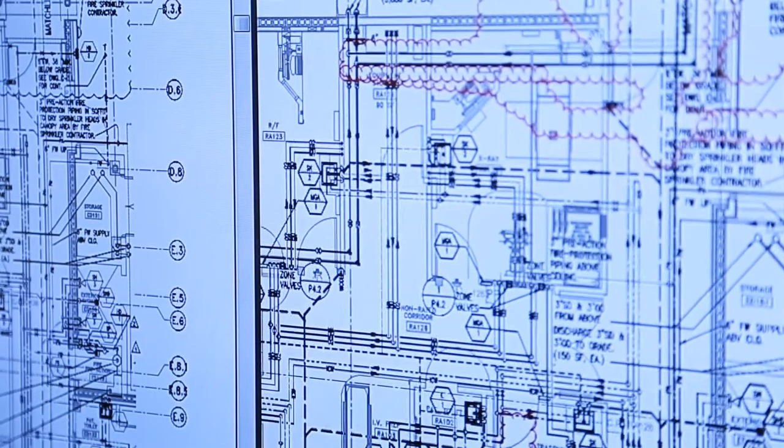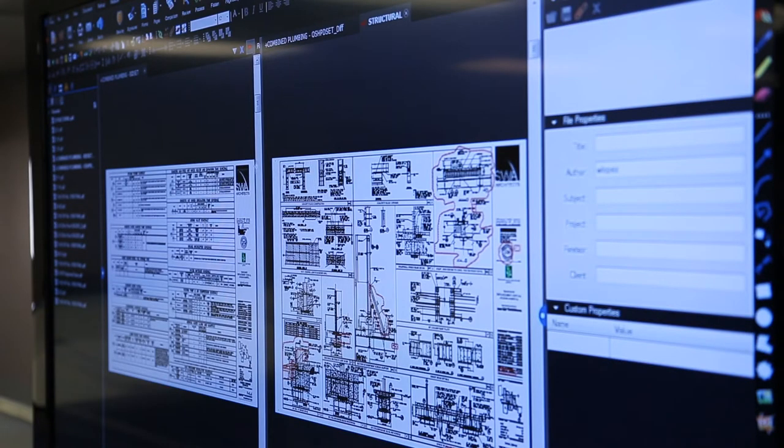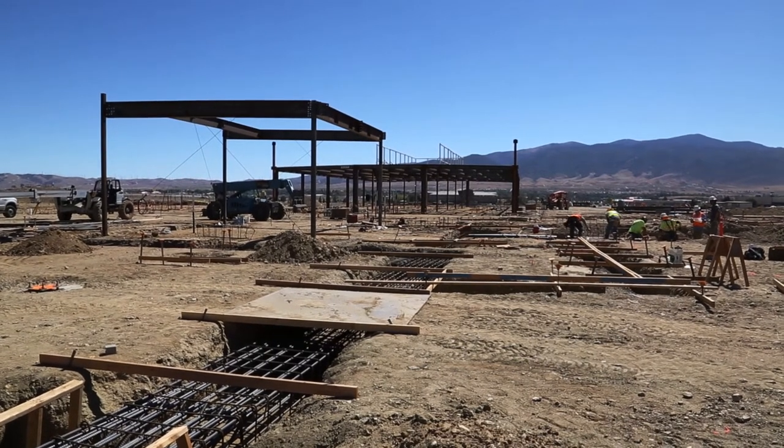Using Bluebeam's Revu compare documents feature helped and saved Bernard's Colombo a lot of time and man hours, and man hours equate to money. Instead of having to deal with the antiquated way of doing things via light table or manual review, we automated the process and we saved it. A process that would take a group of individuals a couple months took one individual a couple hours of actual technical work and maybe 1 or 2 weeks of footwork to gather all the pieces that I needed to do the work.